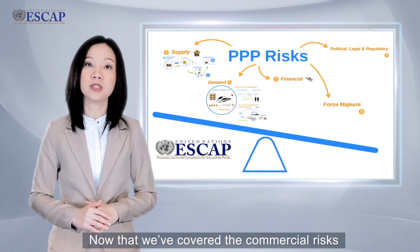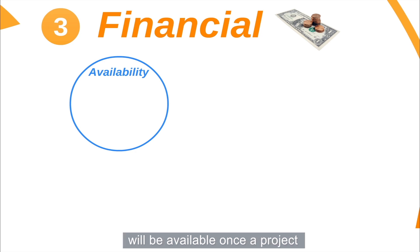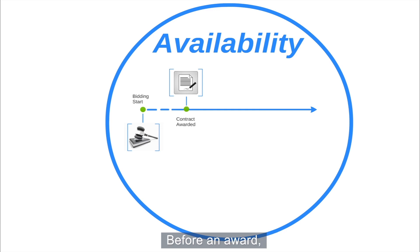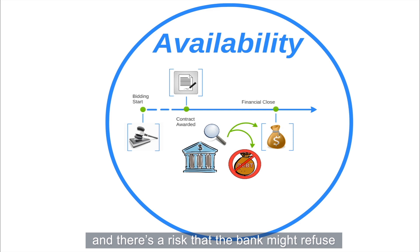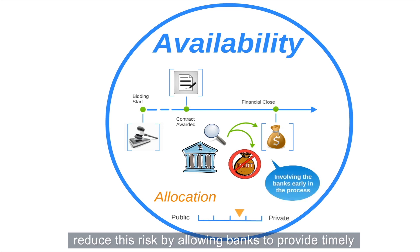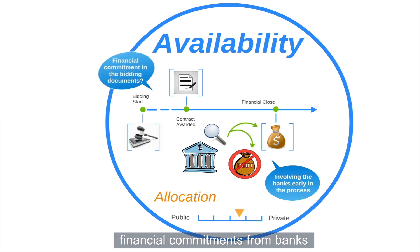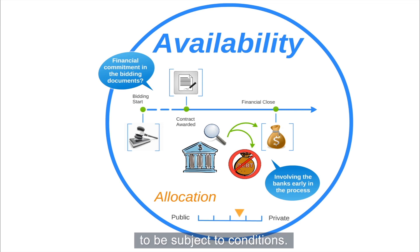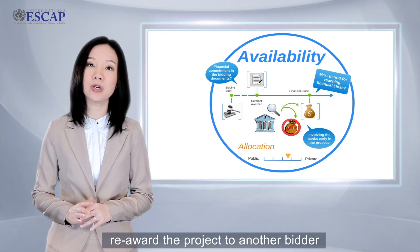Now that we have covered the commercial risks on both the supply and demand sides, let's review the financial risks faced by PPP projects. The first financial risk concerns whether funds will be available once a project is awarded to a preferred bidder. Before an award, the bank may not be in a position to provide a detailed review of project documents in order to make a final decision, and there is a risk that the bank might withdraw financing following their due diligence. This is a shared risk, as both parties have invested considerable time and money by this stage. Involving banks in the process early can reduce this risk. The public authority can also request financial commitments from the bank, included in the bidding documents, though this may increase transaction costs. The public authority might also set a maximum period for reaching financial close, beyond which it has the right to re-award the project to another bidder.